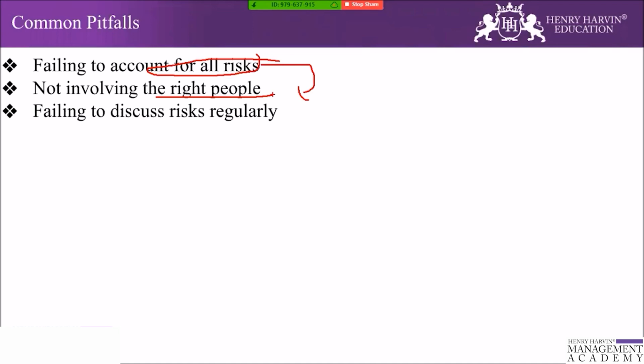Having the latest information allows a team to take action as needed. In daily scrum, it is typical to ask team members if they have any issue or barrier facing them. So including risk at this time is a good way to get updates and plan necessary responses.